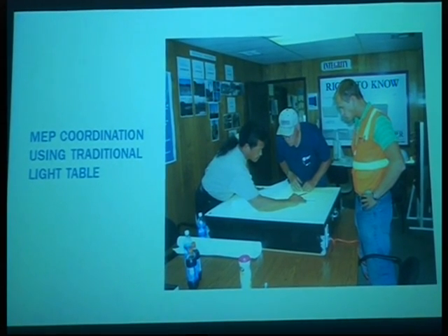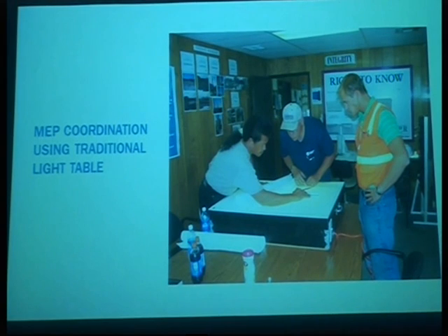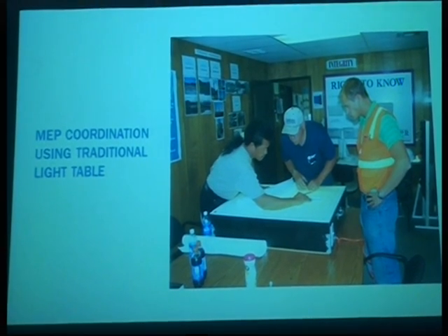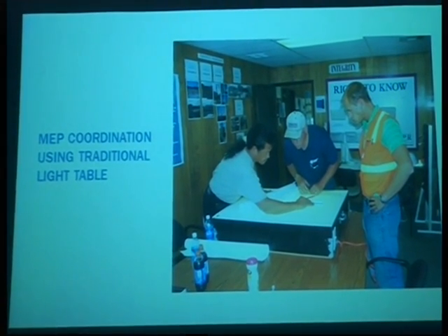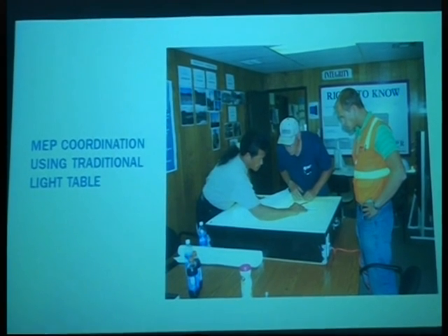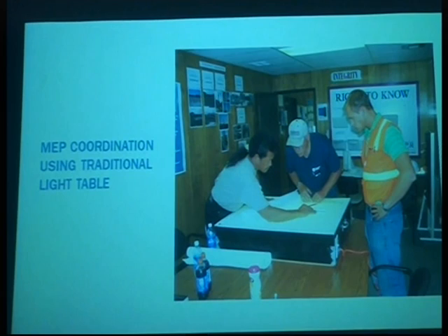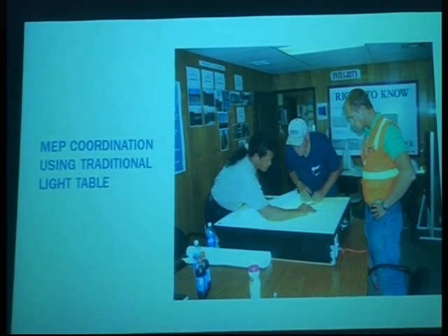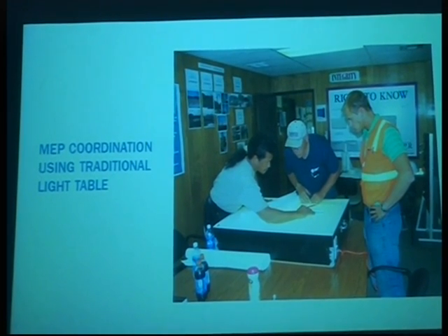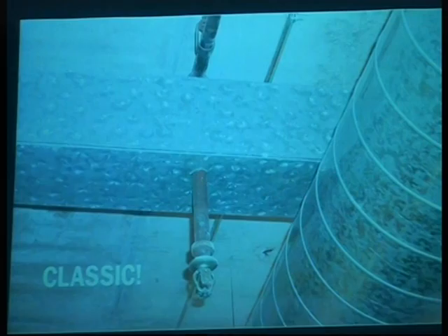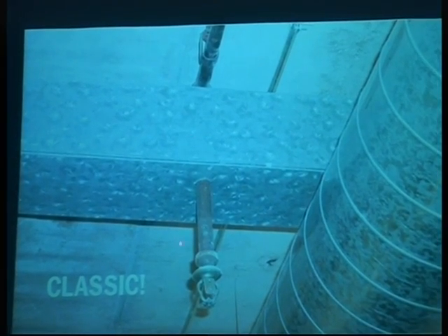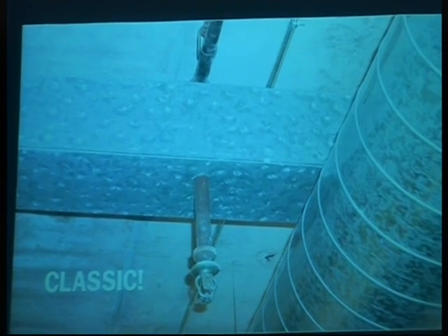And so if you look at an electrical pipe or electric distribution, it's only a single line drawing. Same thing for piping, same thing for HVAC. It's only a single line, and you're not able to decipher elevations. You're not able to decipher the interaction between the two systems. What ends up happening is something like this, where you've got a sprinkler system going through a duct.